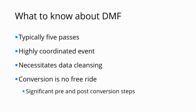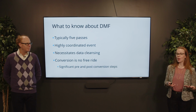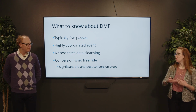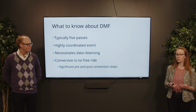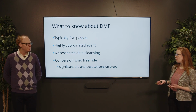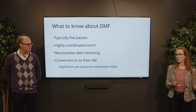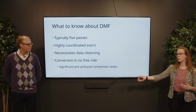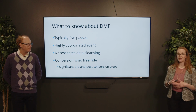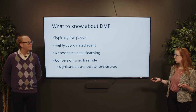So if we're doing a conversion or an upload, oftentimes if we're missing a day or 2 on the project schedule, we're running a little bit behind, we can finesse that and we can flex it. With DMF, a delay of even a day or 2 could actually result in weeks of project delay because of needing those Infor resources to do their component. It's also not something that happens quickly. Those first initial passes are often 4 to 5 weeks in length, and there are pre-migration tasks that need to be done to set up and get the data ready. Then there's Infor's data migration factory processes, and then there are post-migration tasks as well. So the entire process needs to be highly coordinated, highly planned, and will probably take a significant amount of project time to execute. Yeah, exactly.